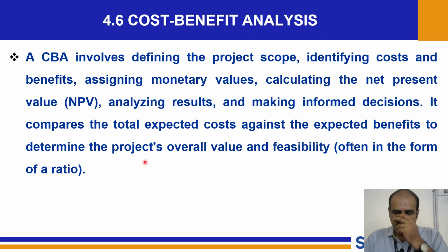So there are two takeaways in this regard. The first takeaway comes from the designing case, that is the first output from the CBA in the designing order: we'll be getting a ratio. This ratio will tell us whether to proceed with the project or not. There will be a threshold value. If it is less than the threshold value, it is decided not to proceed with the project, as the project is not financially beneficial for the organization. On the contrary, if it outperforms the threshold value, then it is believed that the project is financially beneficial for the organization. That is the role of the ratio.